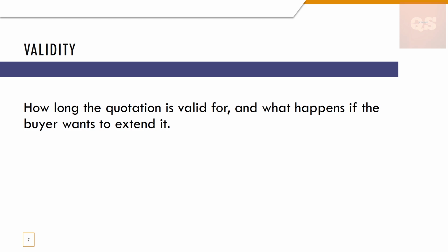If you are making a decision after that validity time, there might be chances that the price might increase or the conditions might change. That again should be made clear, and you will have to decide on finalizing the quotation based on that validity date or time.